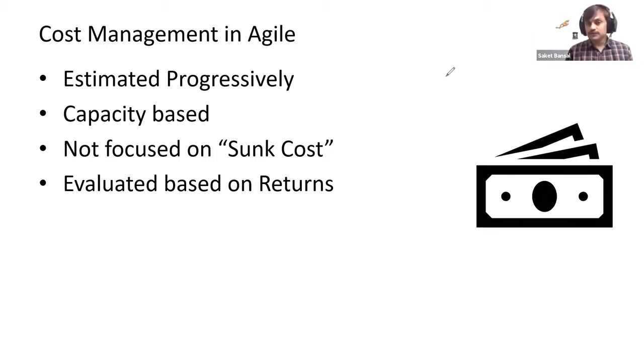So in an agile world, if you say my cost is fixed, then you need to play with your scope. Or at times a little bit, mainly scope. So usually the flexibility in the agile world remains on the scope side. In the non-agile world, sometimes scope is non-negotiable. Scope is fixed. You need to focus on time or cost only.